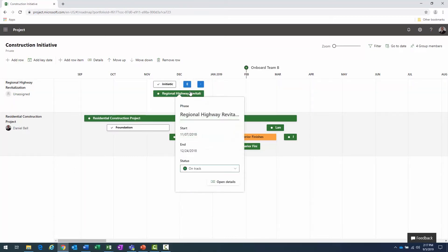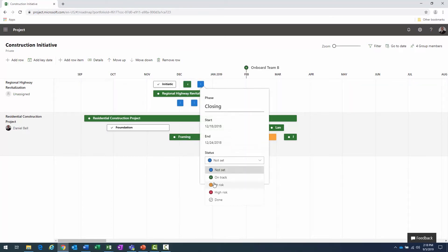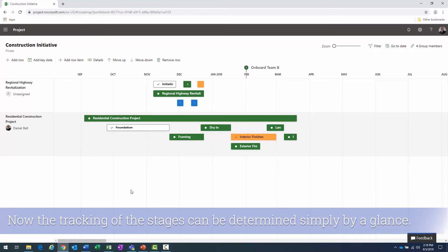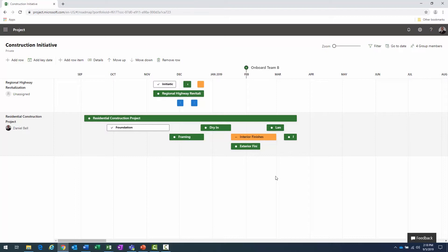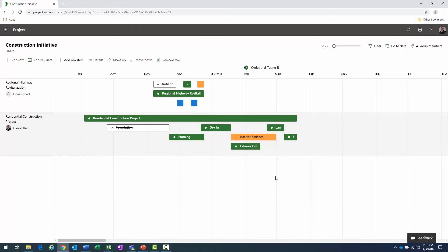I can change these items to green for 'On Track.' Some could be 'At Risk.' That's basically how I change the status — so when other individuals look at this roadmap, they can quickly consult the legend and identify what's on track, what's at risk, what's high risk, and understand what's being managed and what's in trouble.